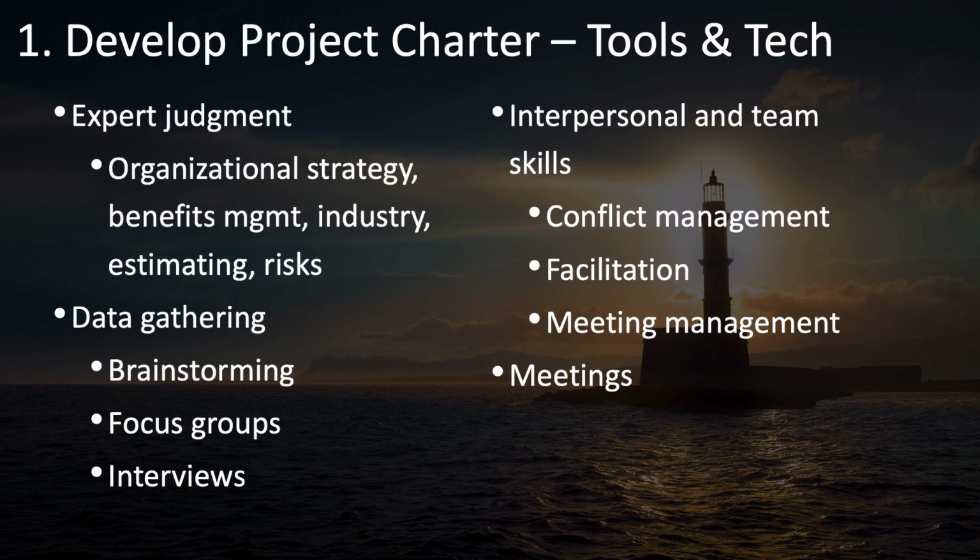The three main tools for data gathering that are listed include brainstorming, focus groups, and interviews. Brainstorming lets you quickly identify ideas, something that is done as a group with a facilitator, and those ideas are first generated and then analyzed. Focus groups are smaller groups of people, including stakeholders and subject matter experts, in which you have small group conversations about the project or its objectives or what success means, what the risks are, identify what the assumptions or constraints are, and so on. Interviews, on the other hand, are one-on-one meetings with people.